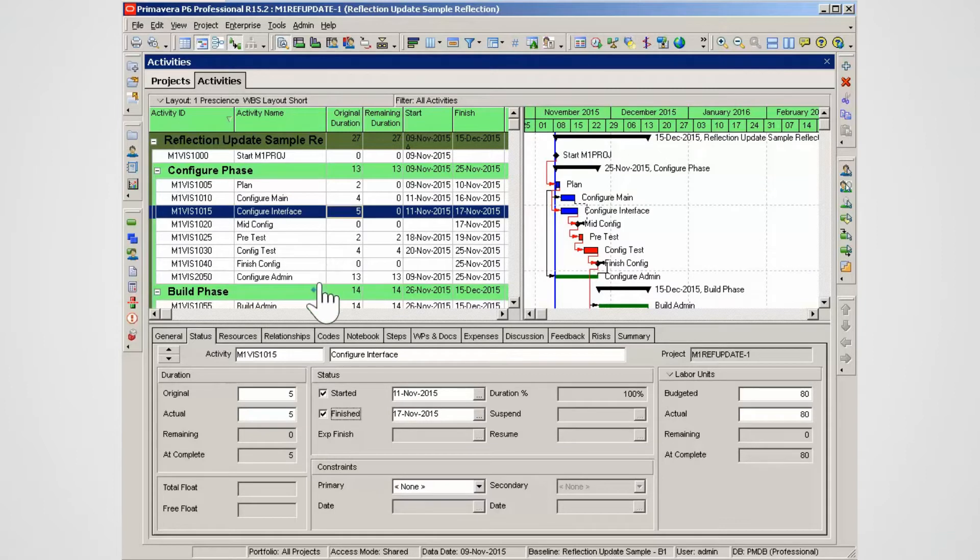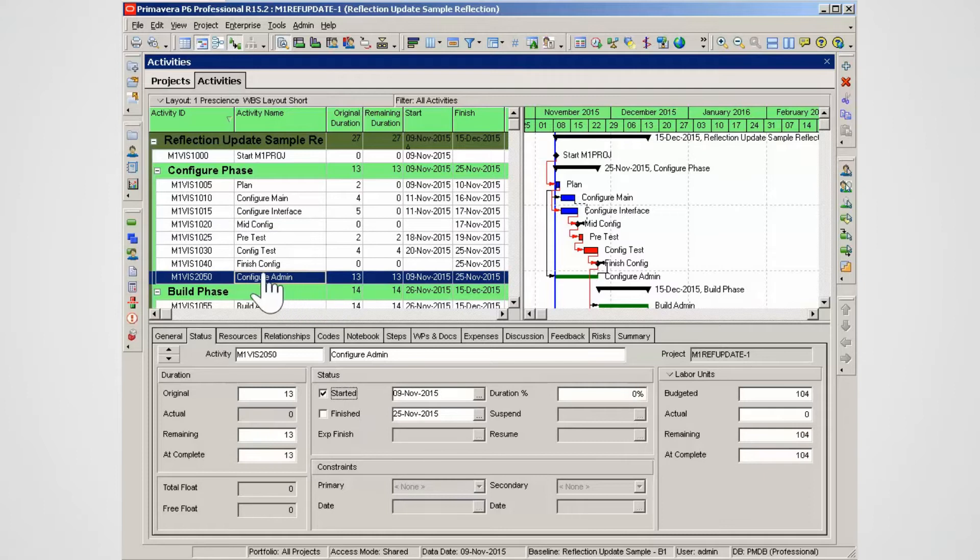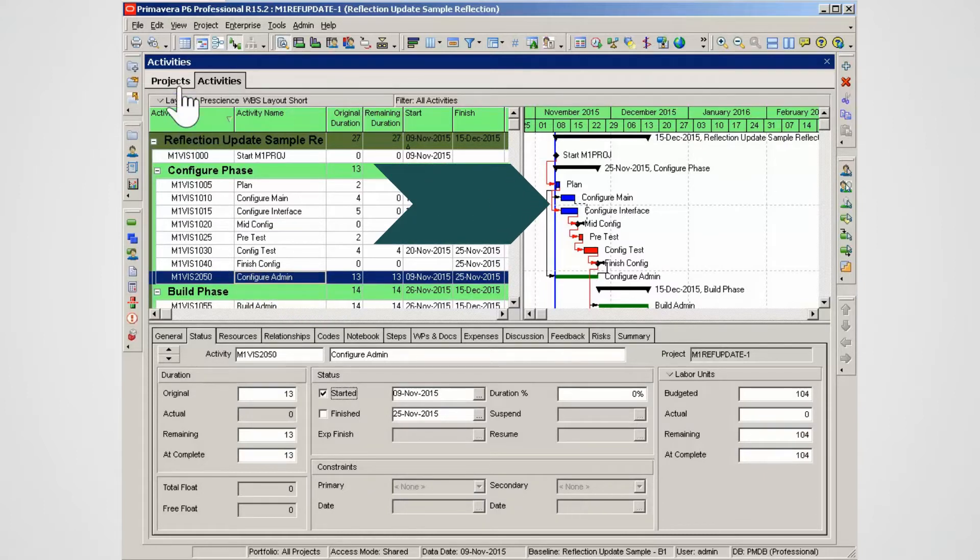The update of the project can be delegated to other team members. Alternatively the XCR is exported, updated externally and then re-imported. Note the update to the project blue bars in the Gantt chart.